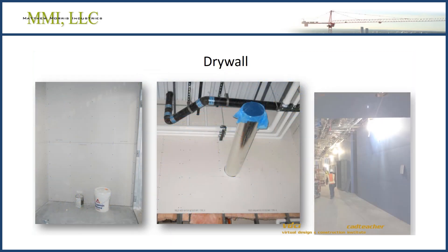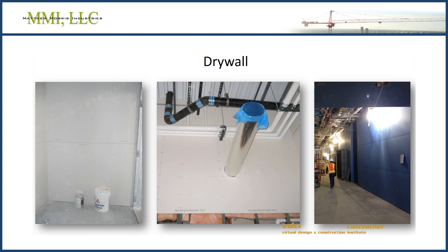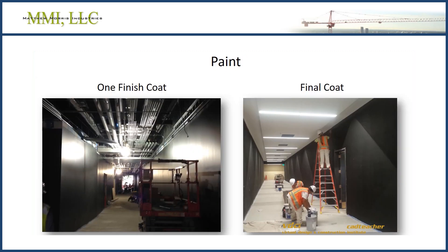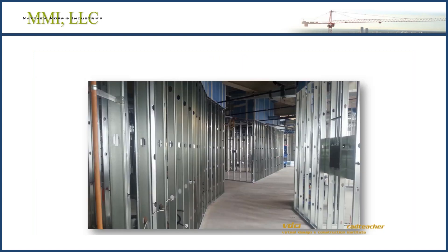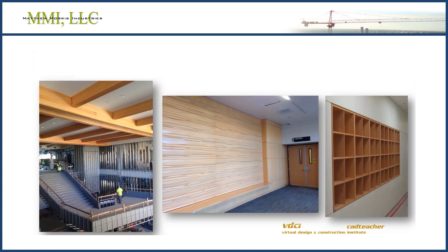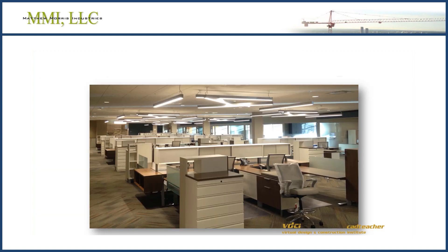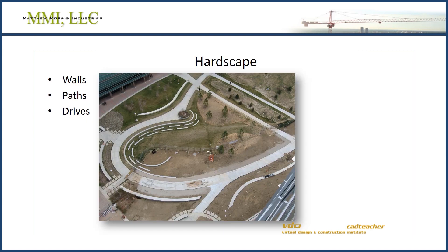In the fourth course, now that the building is dried in, we will move inside to begin the interior. We start with interior partitions, then learn about the numerous options for finishes, followed by specialties and furnishings. Then we move outside to finish the site with hardscape and landscape.